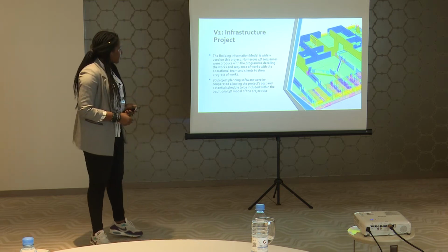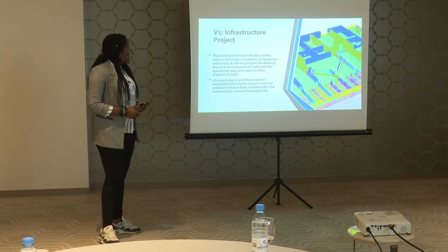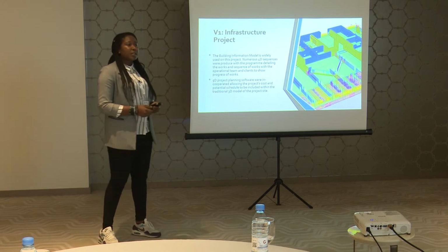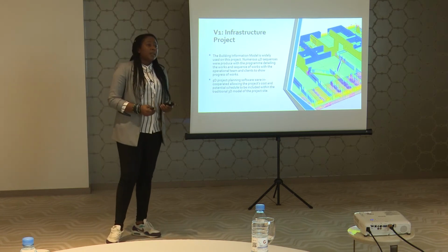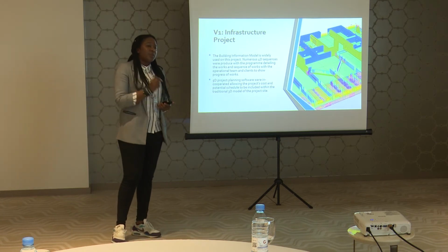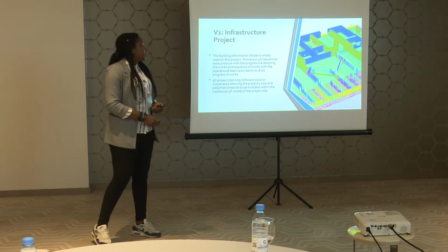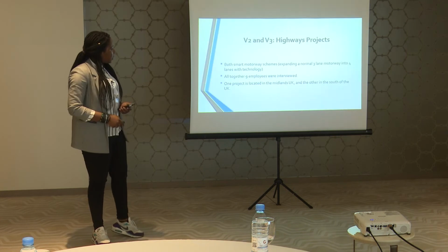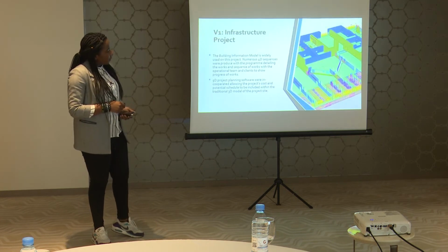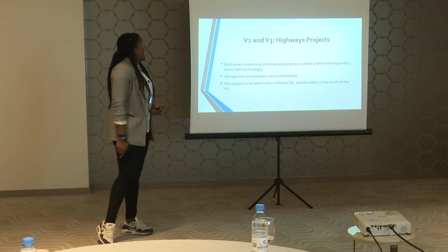They also implemented a 5D project planning software, which basically incorporated cost into the 4D sequence, which had the time element and the 3D model. So that was very helpful. And that's an actual picture of the 3D model of that job.